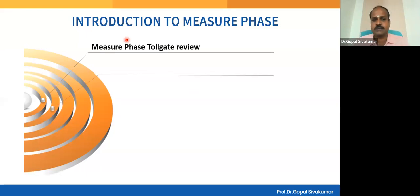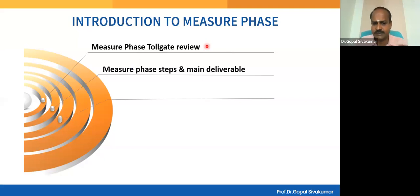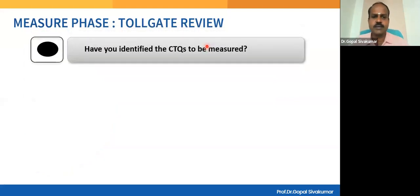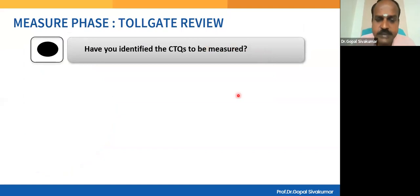At the end of every phase there will be a tollgate review in a Six Sigma project. Certain steps in the measure phase lead to the deliverable of baseline performance. You need to master certain tools. Have you identified the CTQs to be measured? That's why we've been talking about CTQ from the beginning. Even after the measure phase, if the CTQs are not clear, they are not going to solve the problem.